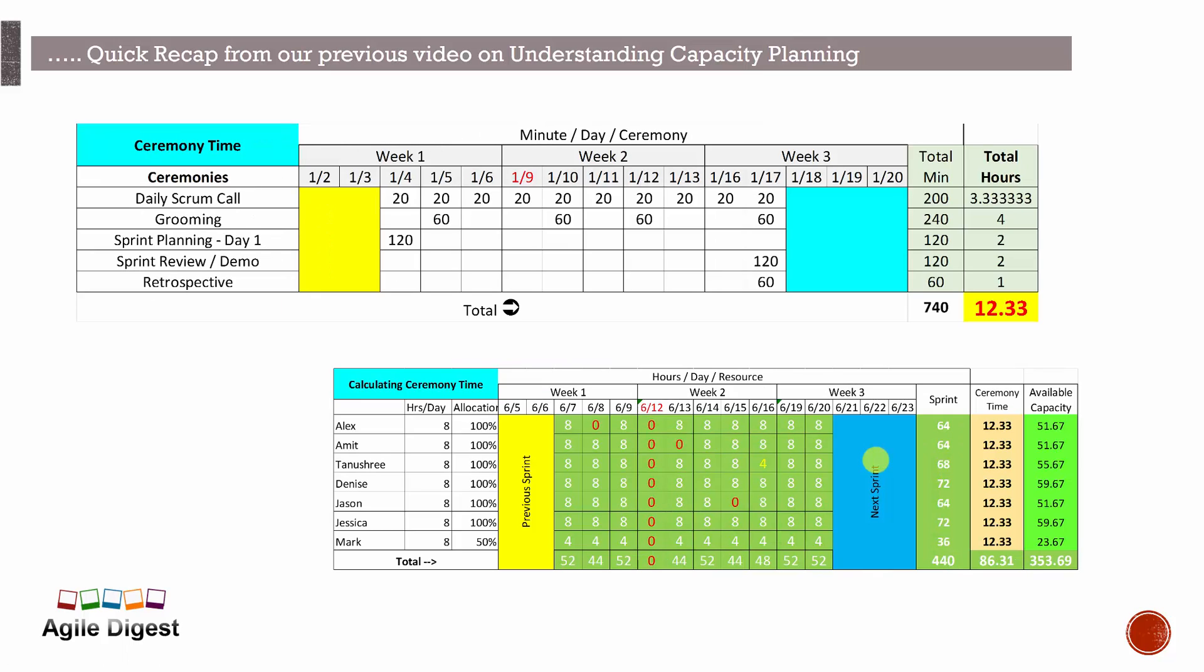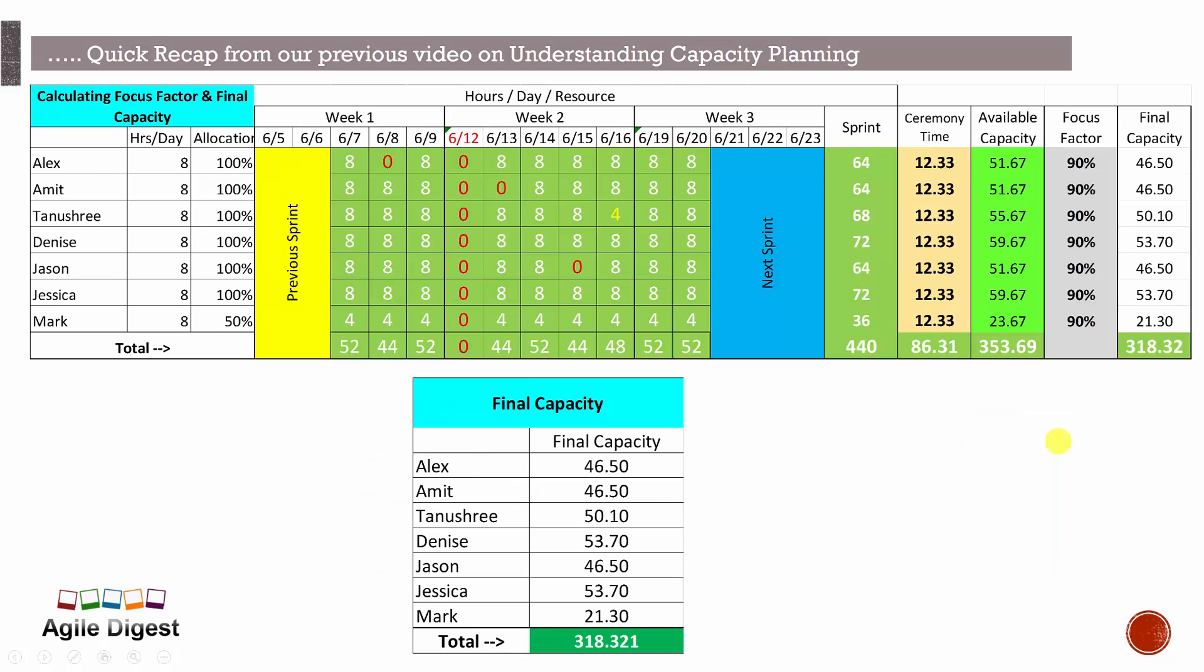Then we looked into, okay, Tanushri is having four hours of work here, means partially is taking a half day off over here. Now we are talking about what are the times we are doing on ceremonies. So it's coming to 12.33 hours we are having as ceremony times that will be consuming. So total it will be coming to 51.67, and finally if we look into the focus factor of 90%, this is 46.50 or 50.10 for Tanushri and 53.70 for Jessica.